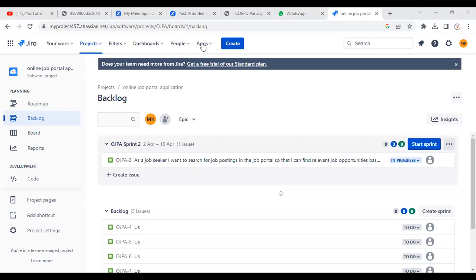Then what about that? Because we have already done some planning for sprint 3. We have no other choice, because that is an inefficiency of the team, right? So my point is, what about the remaining user stories from sprint 2? You will put them in the product backlog. That's what I'm saying. Then when will they be covered? It will be covered depending on the importance of that user story. It will be covered in the next sprint.